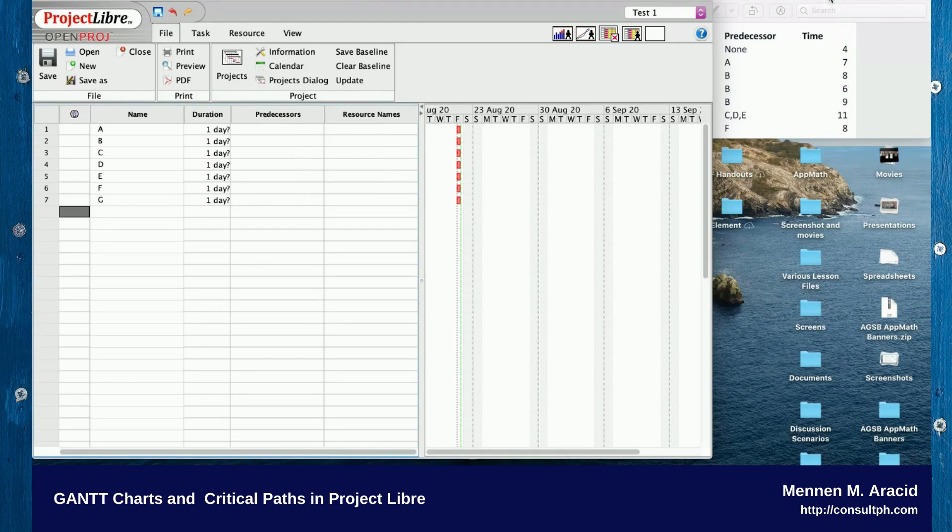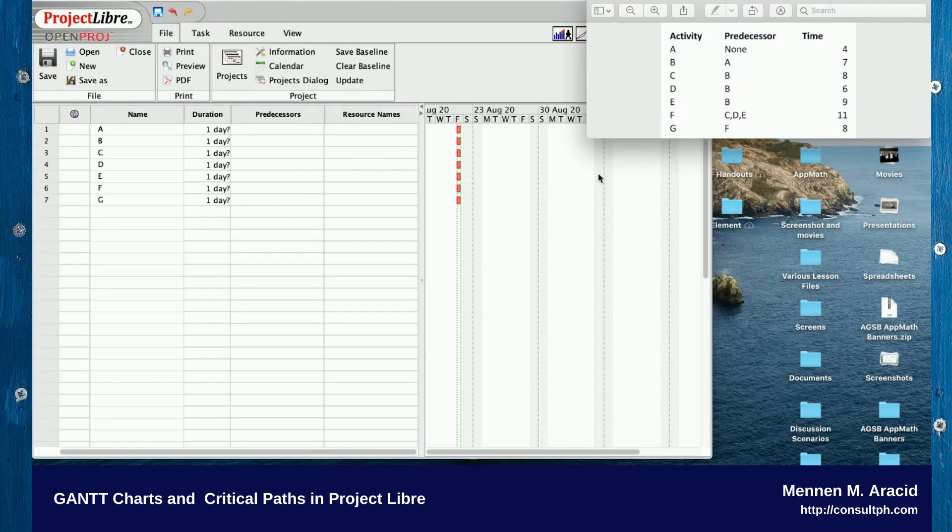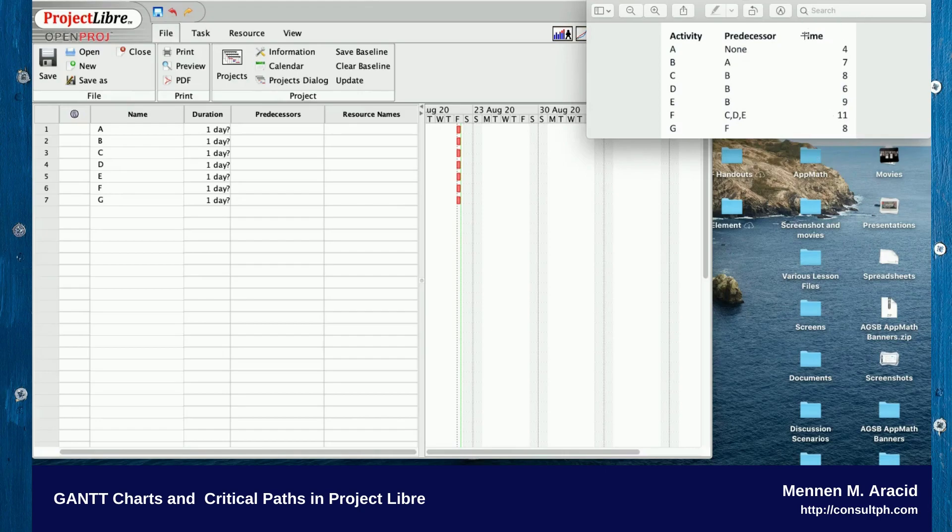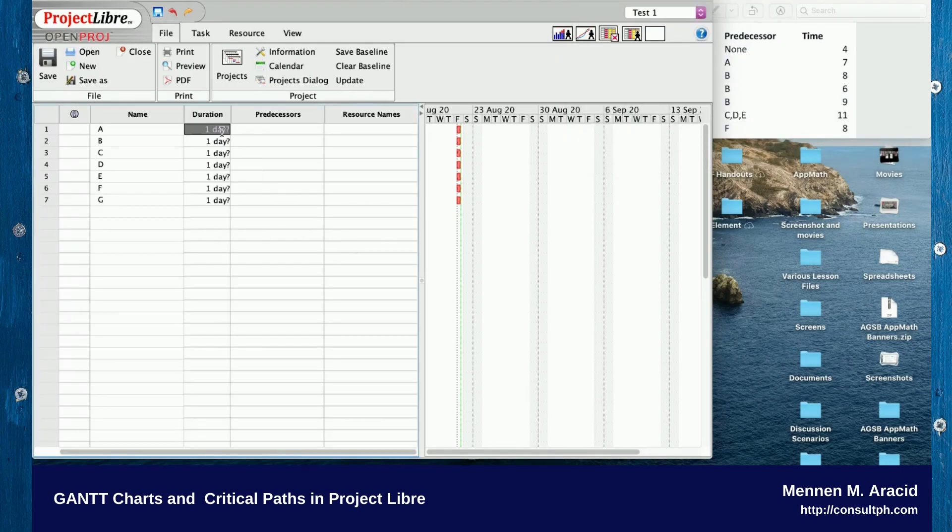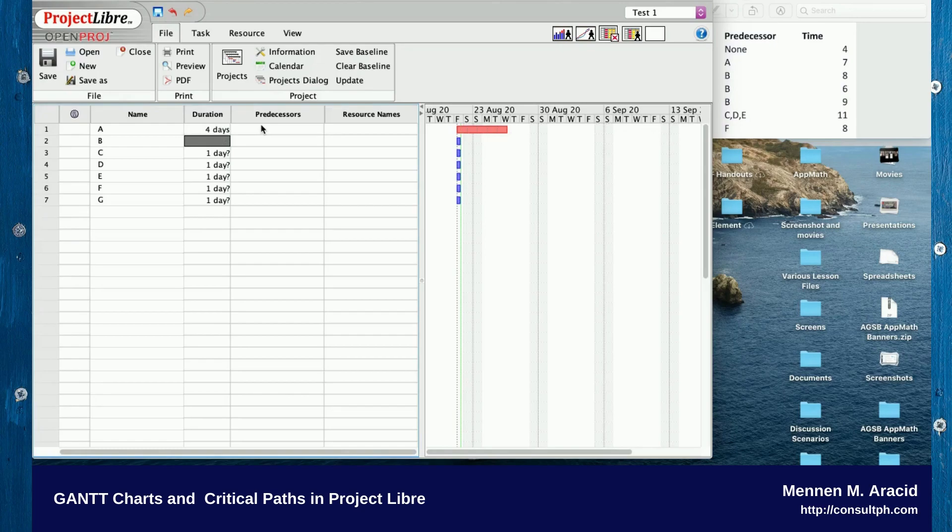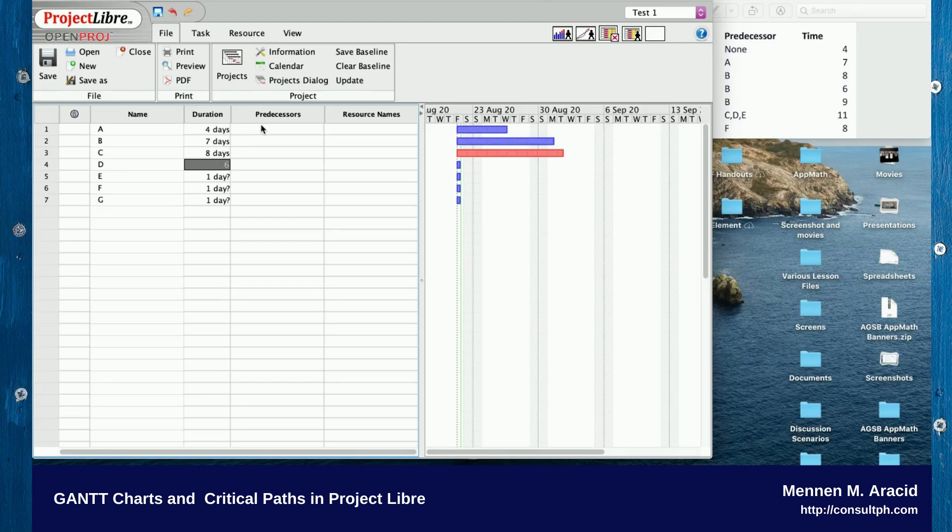I'm now left with Predecessors, and at the same time I'm left with time estimates. The time column goes into the Duration, so I can just write that down. The default is in days, so that's four, seven, eight, six, nine, eleven.